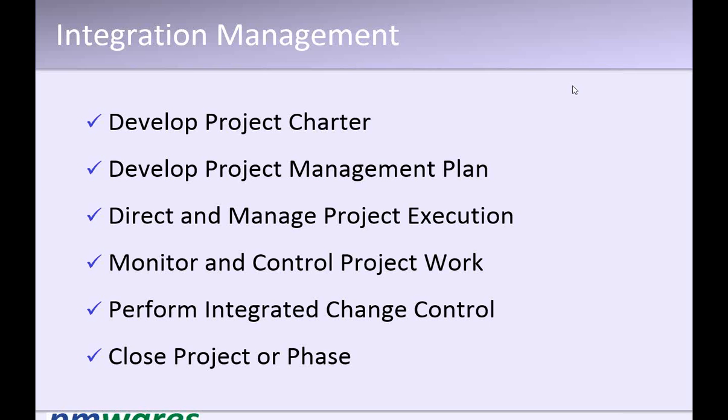So it's coming in both. It's the same thing, it's a part of transition also, and it's part of delivery also. No, see, delivery. What is delivery? Deliverable is what you are going to produce. Now, once all the deliverables are accepted by the stakeholders, you need to ultimately give all these deliverables to them. So transition is nothing but the already produced deliverables being handed over. The ownership is changing now. Till this date, the ownership was with you. After this date, the ownership is with them. You are not doing anything, you are just giving the deliverables to them.